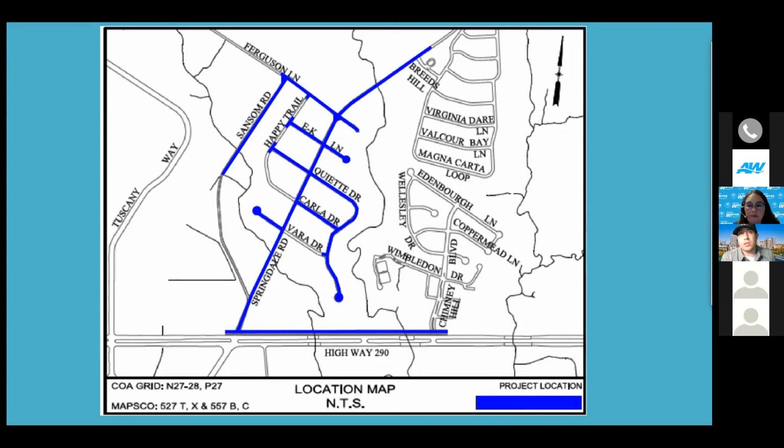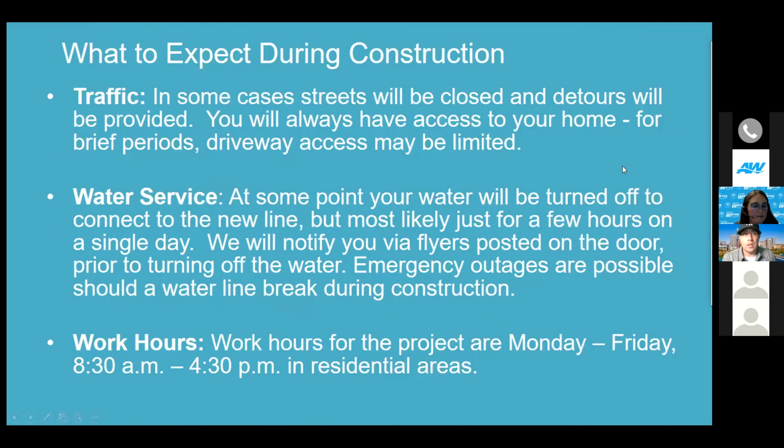One thing to notice is the hours in which we'll be actually operating that were up earlier. The city likes to keep those hours a little bit after rush hour and right before that 5 o'clock hour. So we'll be working diligently between those hours. And again, within city policy, if those times change, we'll make sure to notify and things of that sort.